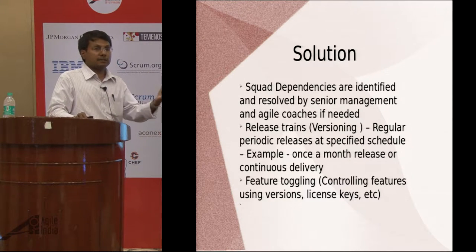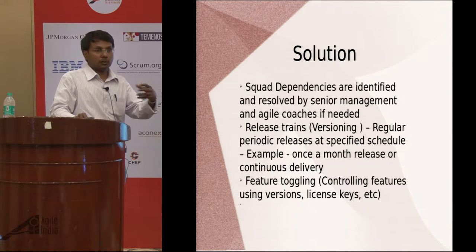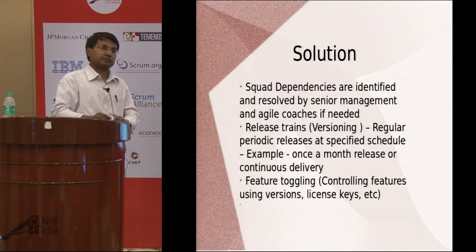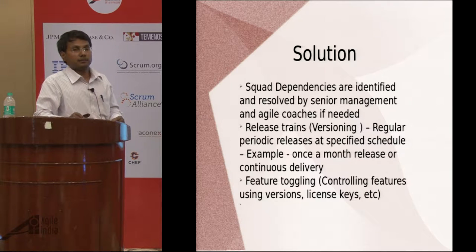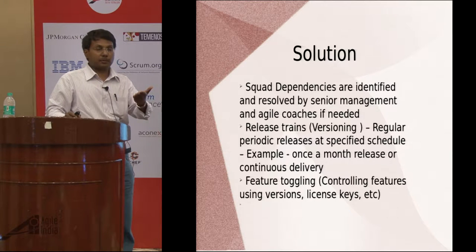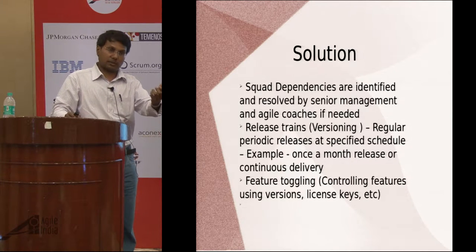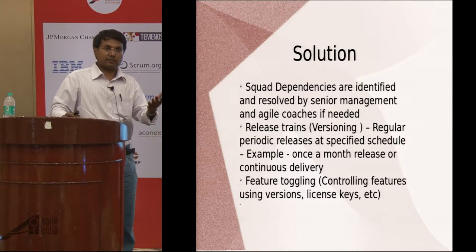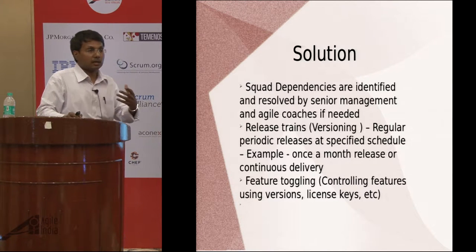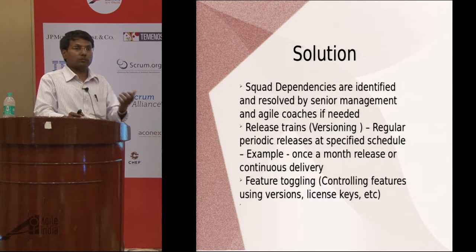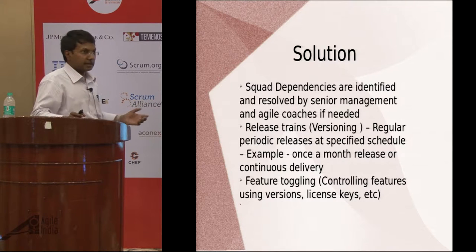The size of the squad is limited to 10 maximum. If you require more work, you split the functionality into two independent parts and let them work together. Ideally you should have a single product owner for each squad, but a product owner may take care of multiple squads depending on the situation. Based on the product owner's workload, your backlog, and organizational needs, you decide how to form the organization structure.